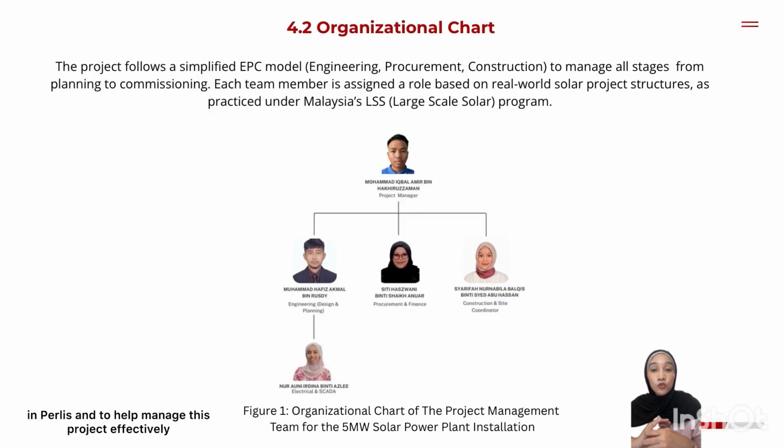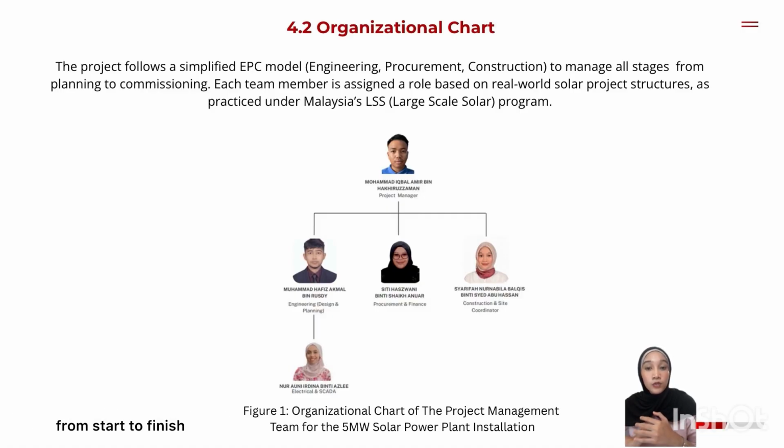And to help this project manage effectively, we have adopted a structured EPC model, which is engineering, procurement and construction. This model is commonly used in Malaysian large-scale solar, where it helps ensure clear division of responsibility and smoothness of the project from start to finish.